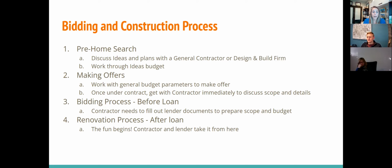But anyone who's local, who has the experience on similar types of projects, they're going to know, hey, there's a good chance, we give you a price to replace it, but there's a good chance that the plumbing will have to be replaced too. So you should factor that in. You can always back out costs as you go along, but it's much harder to add costs. So that right there is a huge piece going into the loan.